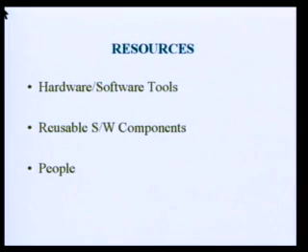Now, as far as hardware and software tools are concerned, these are the tools which will be providing infrastructure to the software. Once you choose your hardware and software, and once you start your developmental work in that direction, hardly are there any chances that you can change them. They come at the bottom of the pyramid of software development resources. So in these three resources, the first step is software or hardware resources. If you go wrong in the selection of the proper hardware and software, then the remaining resources will also suffer, and you will be unable to estimate the requirement of the remaining resources also.